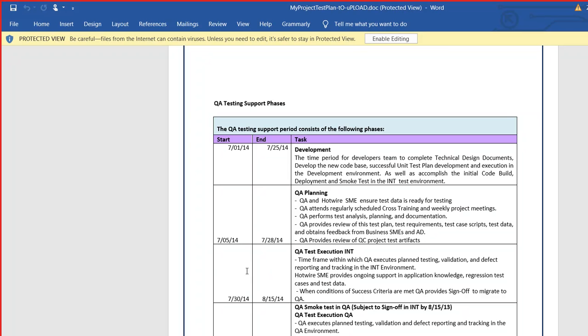Basically, once your testing is done, in this phase here, a meeting happens, and then a formal sign off happens about the project. When testing is done, bug fixes are done, and then a formal sign off happens, and after the sign off, the software goes to production. Does it make sense how this planning works?